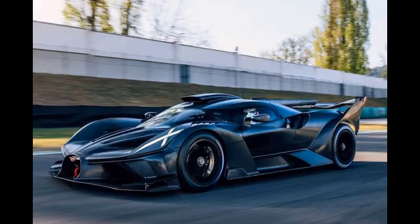Potential drawbacks: increased cost compared to internal sourcing. Engine builder quotes likely range from $50,000 to $100,000 for parts and labor. Refine requirements. LJRC analyzes the engine and identifies specific high-performance components needed to achieve the 20% horsepower increase. This refined component list allows them to request more targeted quotes from potential vendors, potentially reducing overall costs.